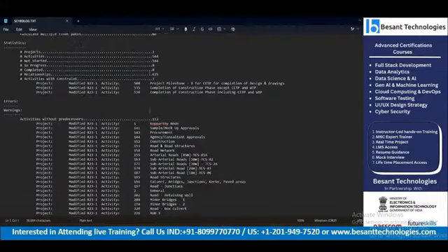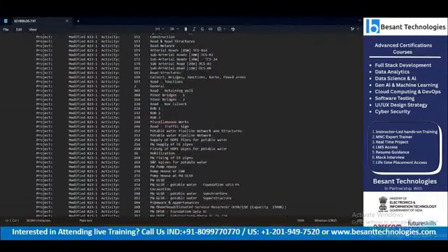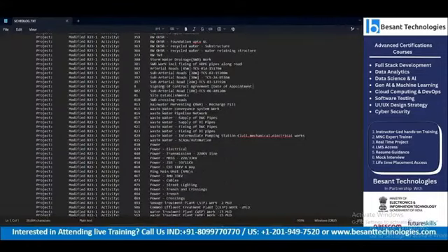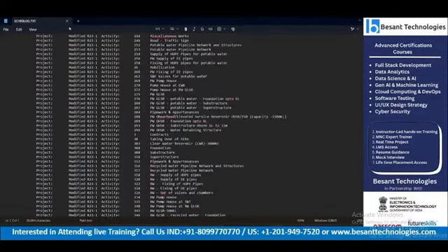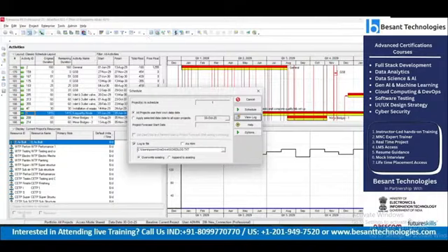It will show which activities are without a relationship, any warnings, even any circular relationship assignment. All these things will be shown here. So this is called a log file, generally used for identifying errors and sorting and closing them. For that purpose, the log file is used.